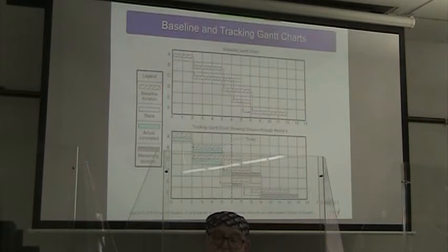B drops down to D, which runs for 3 time periods. C, as you can see, has 1 period's worth of slack, and when it is done, it triggers activity E, which also has 1 period of slack in case we need it. And all of this adds into F, which takes 4 time periods to complete.